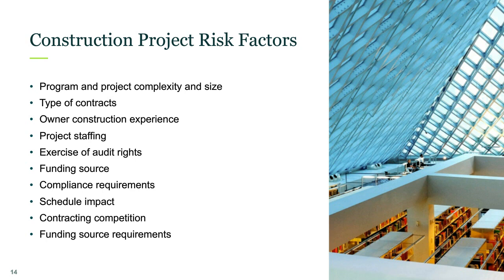Funding source requirements and compliance requirements. Where's the money coming from? Are you allowed to use it for your construction program or project? For example, as I mentioned earlier, in California Prop 39 requirements only allow you to use funds for projects specifically listed in the ballot language. If you spend your money on non-compliant expenditures, you could be putting your organization at risk.